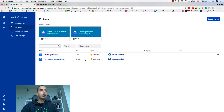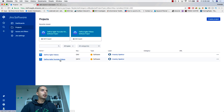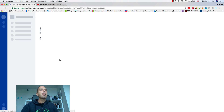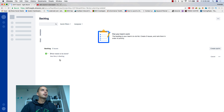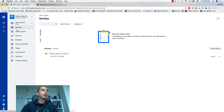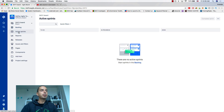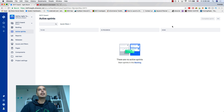We're selecting one of our projects — I'll select my Scrum project called Define Agile YouTube Videos. Then I'm going to Active Sprints, because this is where the board is in a Scrum view. So I have my columns: To Do, In Progress, and Done. I have a new QA coming, so I want to put In QA between In Progress and Done.